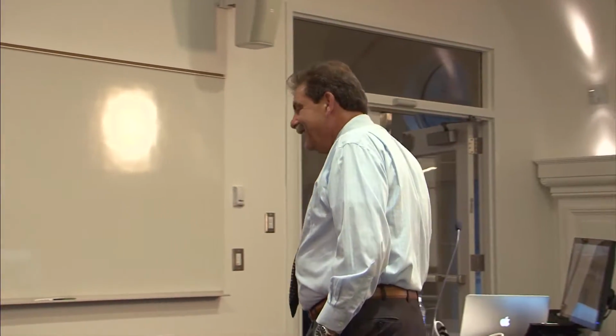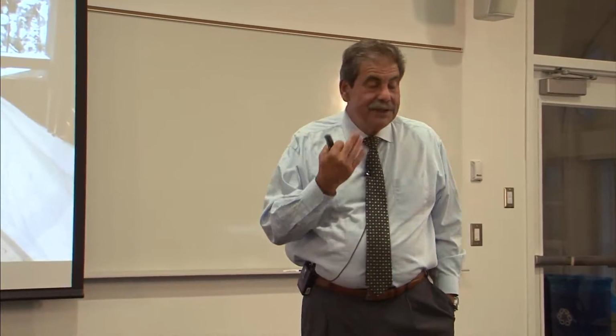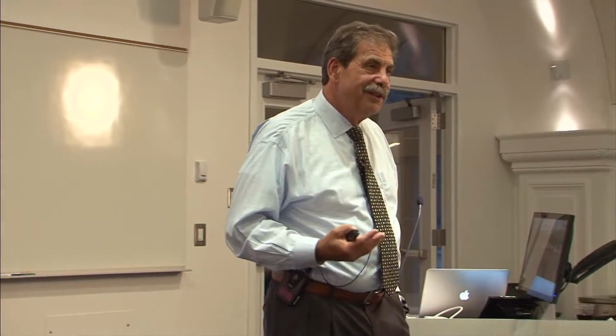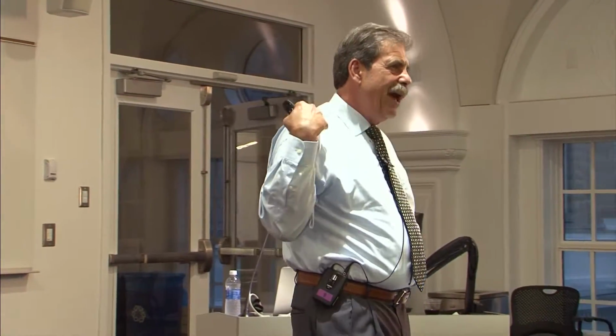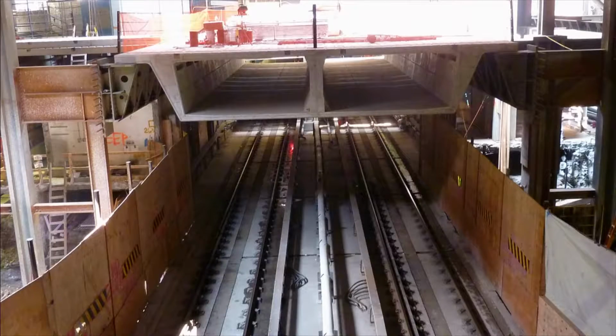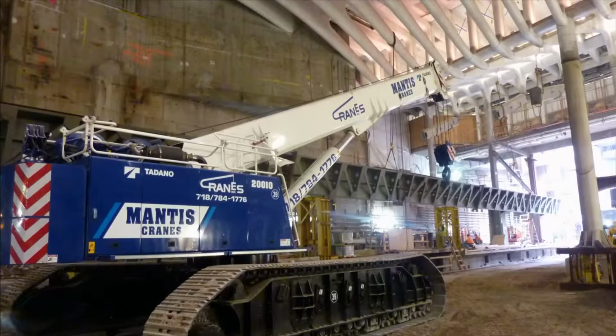Another challenge on the job, as the dean mentioned, we had to operate around operating railroads. Not only the one line, but the PATH system. We're completely rebuilding the PATH station after 9/11, and we had to work around railroads that operated 24/7. When you get what's called a general outage, you get about 50 hours on a weekend to work without a break. Not only that, but we had another challenge.